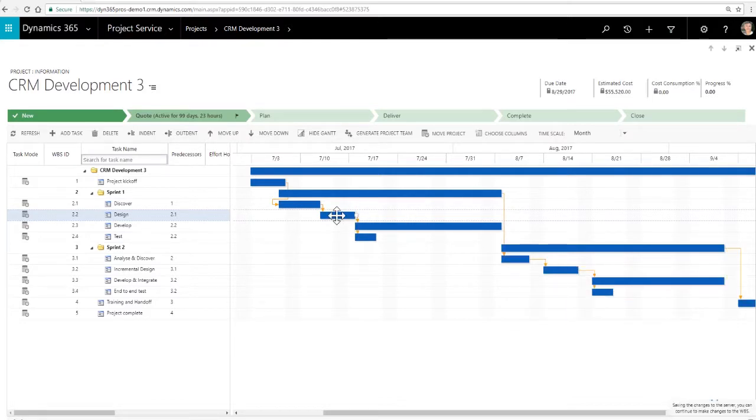As you would expect, as you are accustomed to seeing in Microsoft Project, you've got obviously this spread across the different calendar weeks. We're at a month scale. We can certainly change that to a weekly scale if we choose to. A little easier for our demo to see it at the month level. But because we start with a template, you can go in, and once you've decided, all right, we're going to have a start date of July 1st. Well, July 1st is a Saturday, so it really, in effect, is going to start on the 3rd, which is the Monday. You can then move the project as you need to, right?